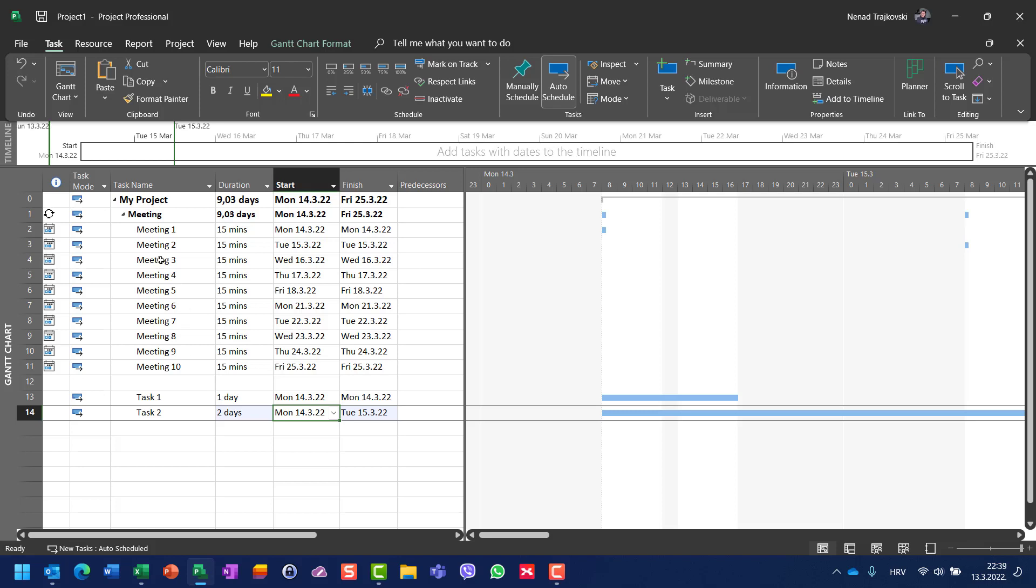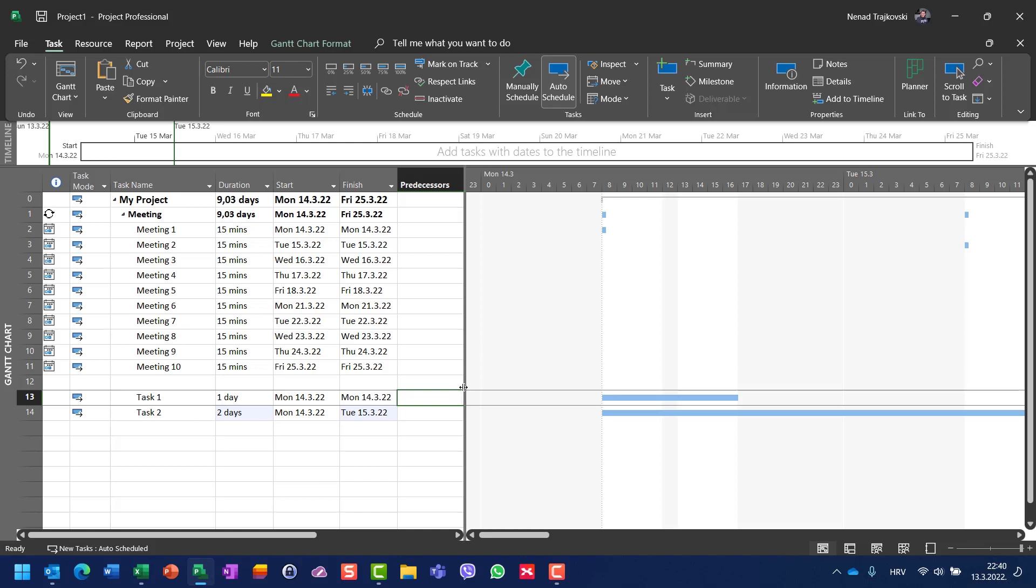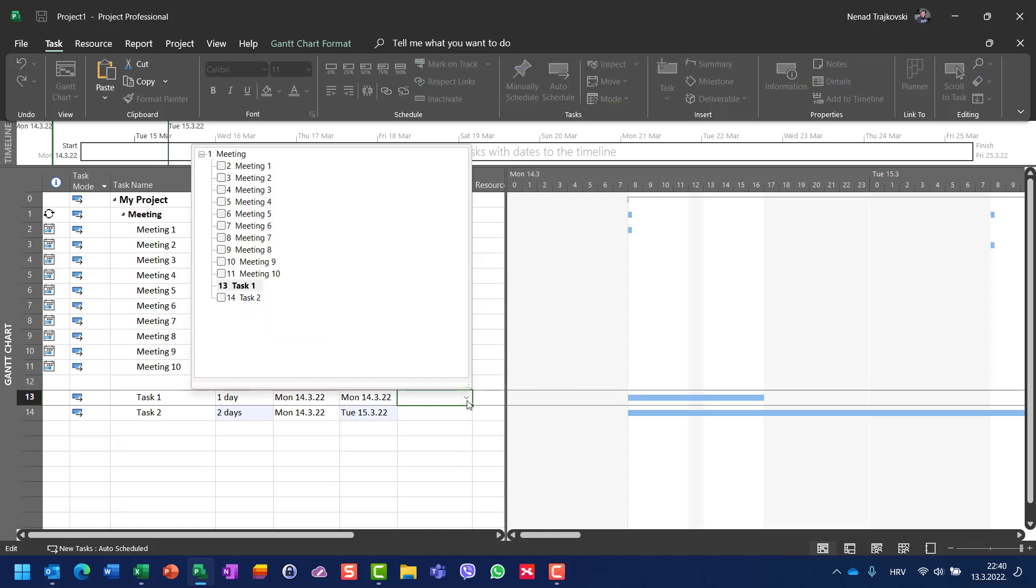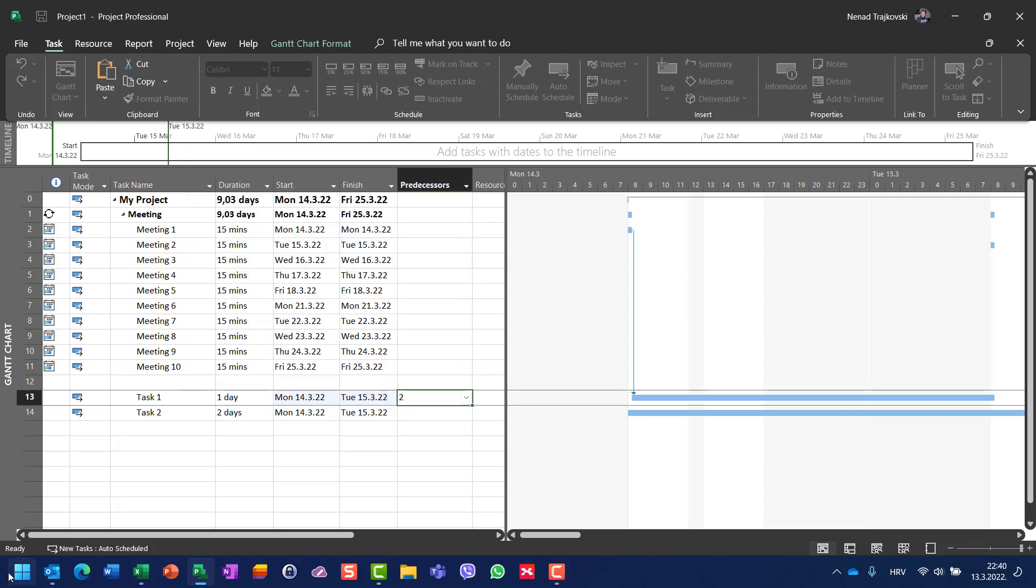Task 1 should be started after meeting number one at Monday the 14th. Beware, when I put the predecessor here—for example, let me show you that meeting one will be predecessor—and when I go back, then my task will start.